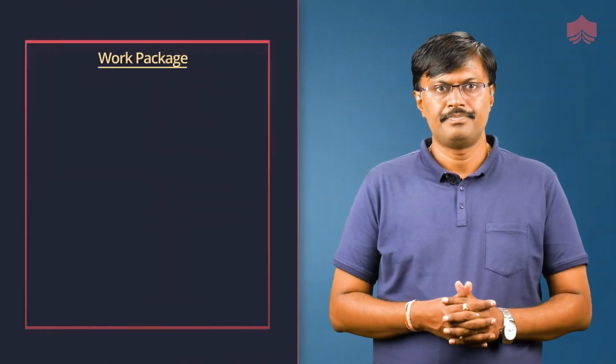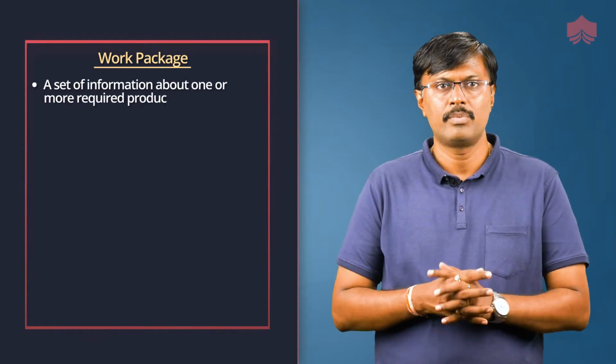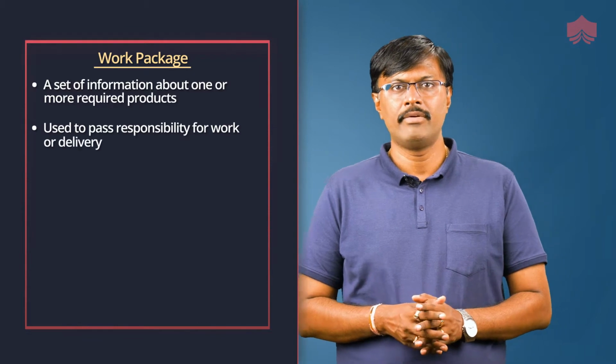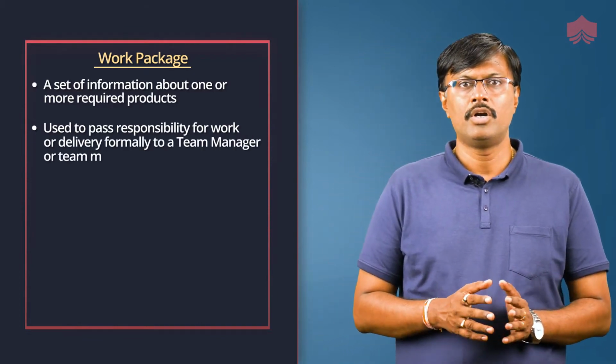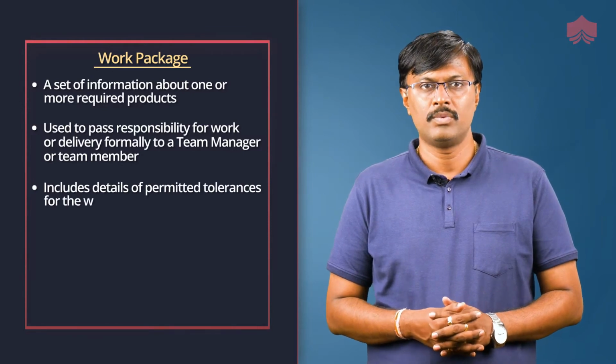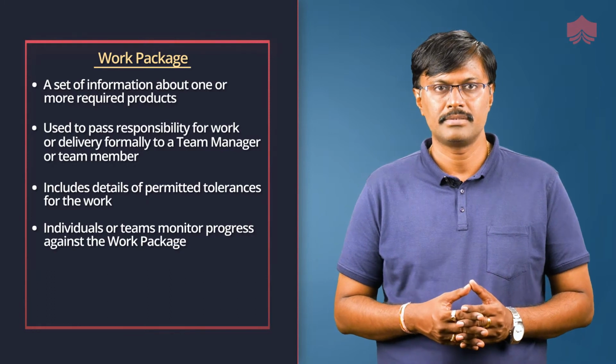Work package. A work package is a set of information about one or more required products, used to pass responsibility for work or delivery formally to the team manager or team member. It includes details of permitted tolerances for the work. Individuals or teams monitor progress against the work package.